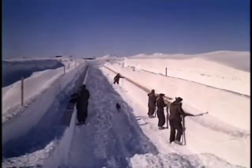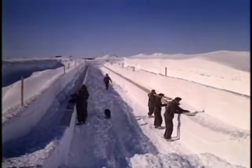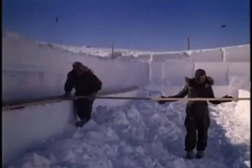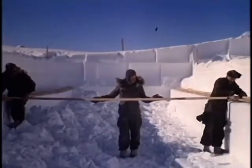When a trench was several feet deep, planks were put down on the shoulders of the cut. Later on, these planks would be used to support the steel arch roof, which would cover the trench.